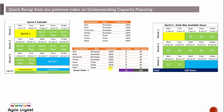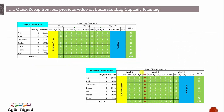For the entire 10-day sprint, everyone has 80 hours and Mark has 40 hours. Looking at the calendar allocation, each day the team has 52 hours of capacity. The total for the sprint including everyone is 520 hours. This is the default distribution.